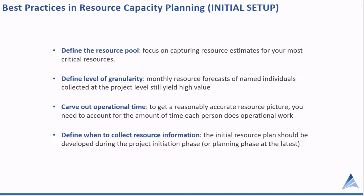Not every team is critical to getting project work done. There are a few key individuals — likely your subject matter experts — that are pulled in many different directions. They are frequently requested for projects, and there's usually a handful of those individuals or a small number of teams. That's the place to start. You may not capture everybody's information, but to get started, you can get a lot of value by focusing on a subset of your entire resource pool — those teams or individuals considered critical or bottleneck resources.